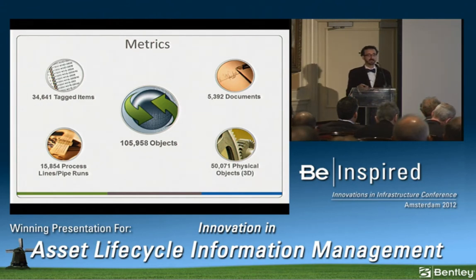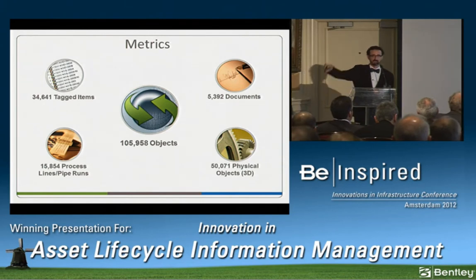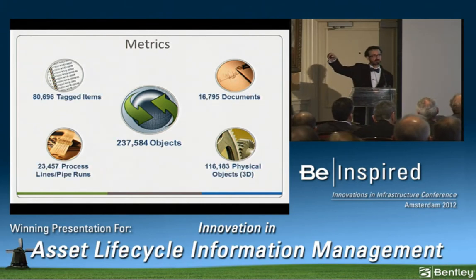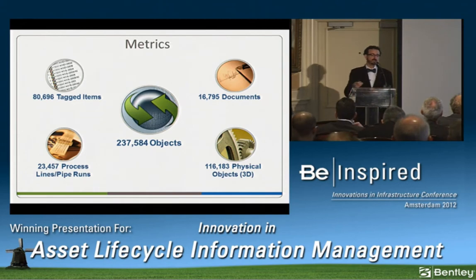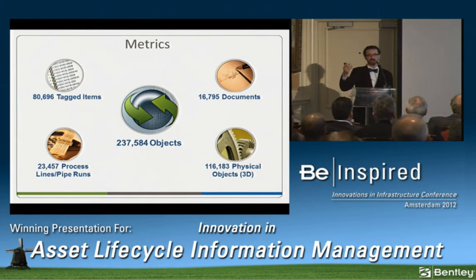those assets. Now, I said last year that this number would double and then triple by project end, and it has more than doubled since last November. Currently, we have 237,000 some odd objects in the system for Kemper County alone. I'm going to go back and talk about a return on investment, and the number that's going to be important is $4 million for approximately 45 people over a 2-year construction cycle, mostly in that startup and commissioning group.